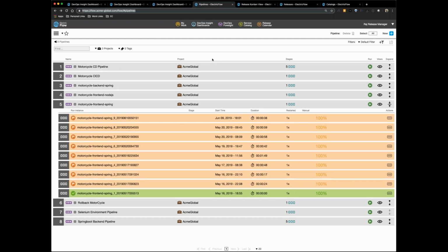Once again, when it comes to releases, the idea of dependency management also comes into play. If you have multiple releases, Flow manages dependencies in two ways. One, through an application dependency. So if you had 3 applications of which 2 are dependent on each other, you can set those dependencies so that those 2 applications cannot go to production without the other.